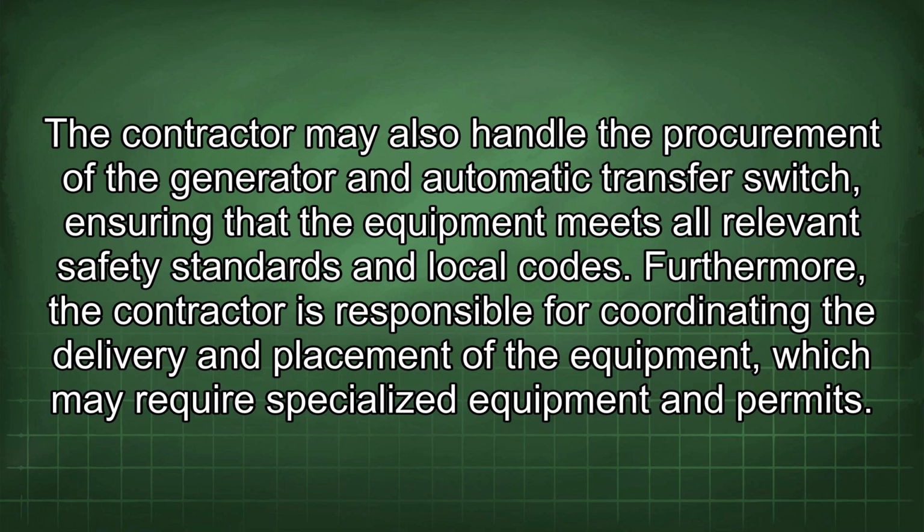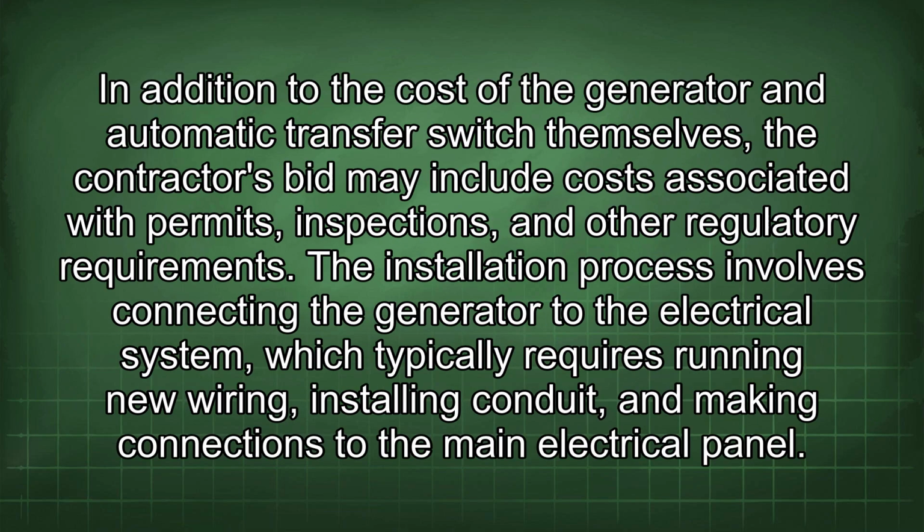Furthermore, the contractor is responsible for coordinating the delivery and placement of the equipment, which may require specialized equipment and permits. In addition to the cost of the generator and automatic transfer switch themselves, the contractor's bid may include costs associated with permits, inspections, and other regulatory requirements.